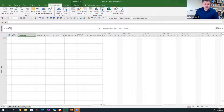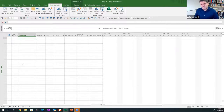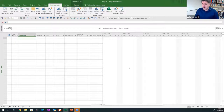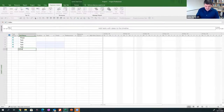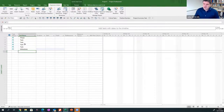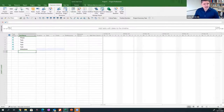Down at the bottom we see 'manually scheduled.' That essentially means the project scheduling engine is turned off and you're not getting the capabilities. Believe it or not, you're using a glorified version of Excel without its scheduling engine running if you're using manually scheduled. There are also issues where the Gantt chart doesn't display information correctly and the tasks don't number correctly. I'm going to enter a couple of values — Phase, then Task — I'll put in four tasks and a milestone. As I enter information, it gets a question mark and a push pin. All it takes is one of those to be incorrectly set and your critical path is wrong.